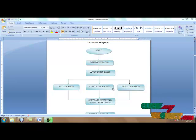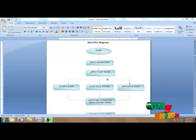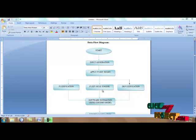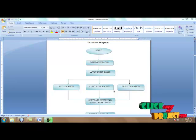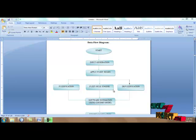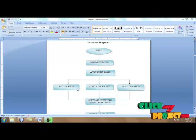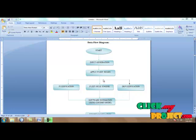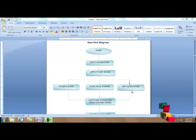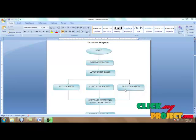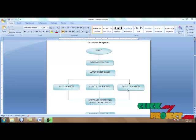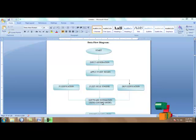In the fuzzy rule engine there are four types. For cost drivers, five cost drivers are used in our process. The first one is PCAP and required reliability. The fuzzy rules are based on four rules: if tool is low then effort is very low; if PCAP is low then effort is very high. Based on these rules, the converted inputs are applied to the fuzzy rule engine. In the defuzzification process, the fuzzy rules are converted back to software attribute values so that we can identify the input values of the process.